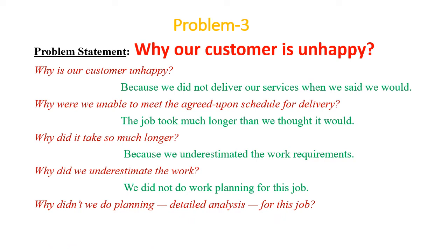So why do we not do the planning? Here comes the root cause, because we are short of planners. So this is the root cause of all the problems. Why? Because you don't have a sufficient number of planners. Maybe there were 5 planners in your department and 3 left the company, and you were left with only 2 planners, and with the 2 planners you have to manage the whole job, and it is getting very, very difficult.